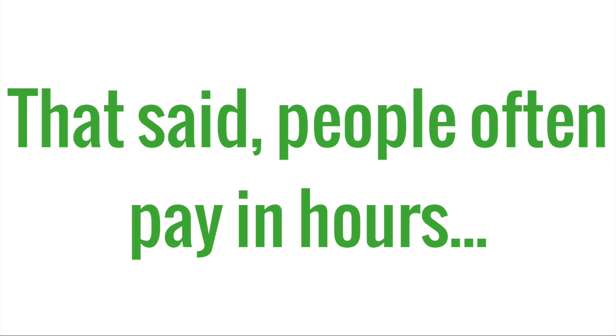On the other hand, people often pay in hours. So there's often an interface here when you're dealing in a client situation where you're being paid in hours, but you're estimating in points. People often want to know how many hours are in a point. And the answer usually is something along the lines of, I don't know, but we do 10 points a week. Unfortunately, that's not a completely satisfying answer if you expect to be getting paid in hours. But that's something that you need to work out on an individual situation basis.